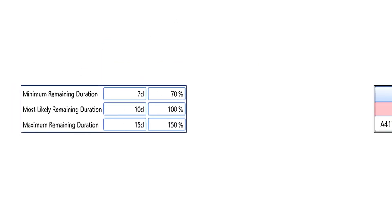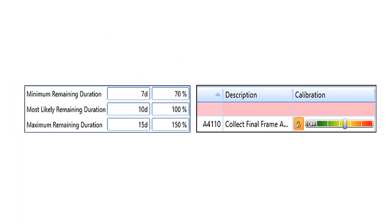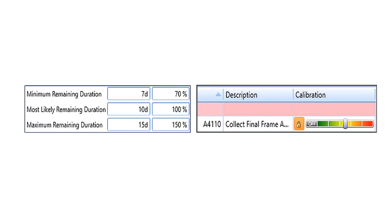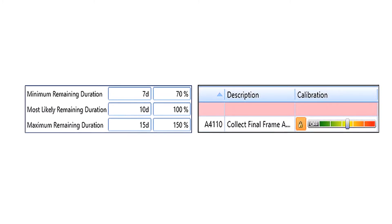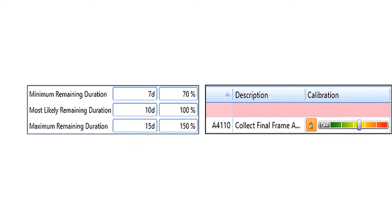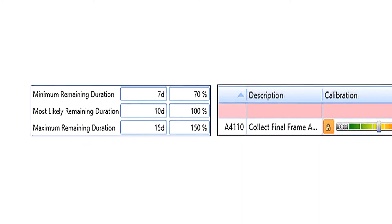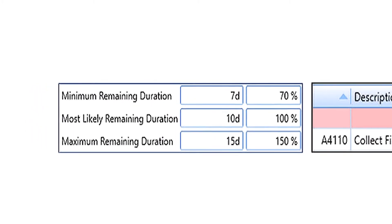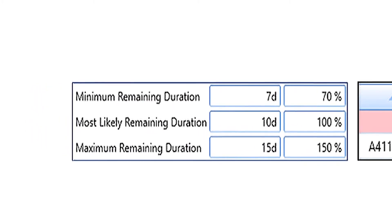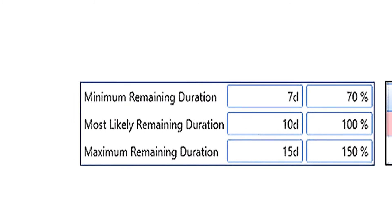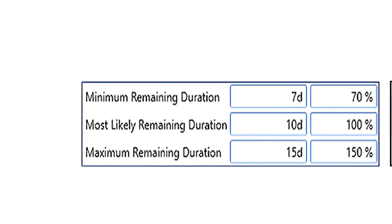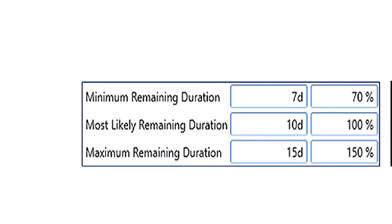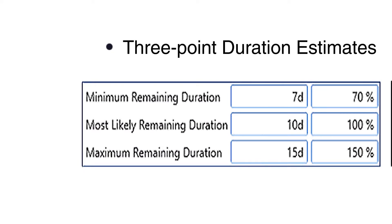Once a sound schedule has been developed, the next foundational elements of an SRA are the Duration Uncertainty Estimates. There are two widely accepted methods of assigning Duration Uncertainty. The preferred and more precise method is to obtain three-point Duration Estimates – Best Case, Worst Case, and Most Likely – from the task owners.